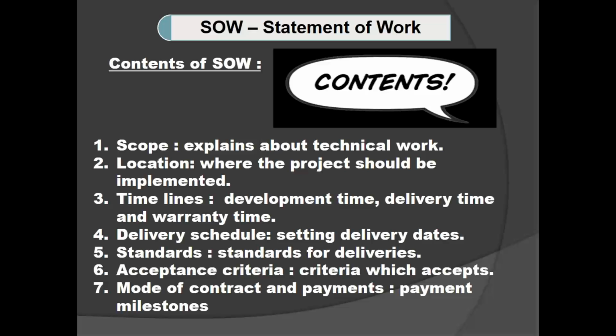I'm going to pay $200 for project leader, $180 for BA, and $150 for each tester and developer. Now at the end of the month, they are going to collect the data and accordingly they will release the payment. So that is nothing but retainer.